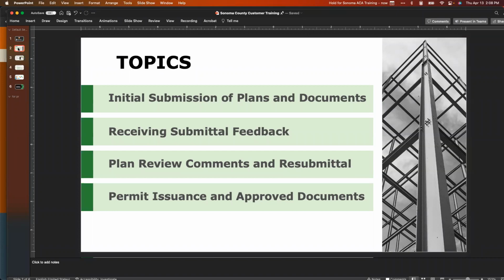Like Nathan mentioned, you will be notified as the various discipline reviews have been completed. So you can begin reviewing those plan review comments and preparing your narrative responses for those. And then at the end of a cycle of plan review, meaning that all reviews for that particular cycle are completed, the digital plan room will be opened back up for you to go ahead and upload any corrections that may be required based on those plan review comments. So we'll take you through that as well.